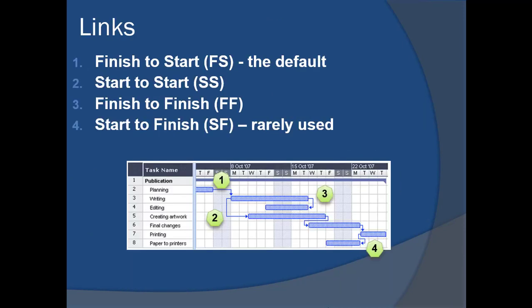Now, how project pieces link together, there's finish to start, start to start, finish to finish, and start to finish, which is rarely used. So I won't discuss start to finish very often. Finish to start is the default. Like something has to complete before another thing starts. It's a very systematic, hierarchical-based structure of like, object B can't start until object A is over, and goes through that mentality and system for it. And you want to make sure that you work off there.